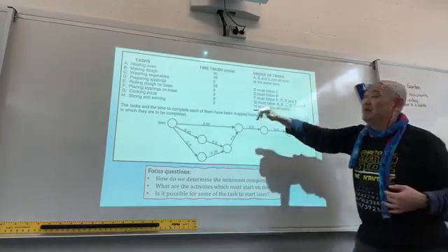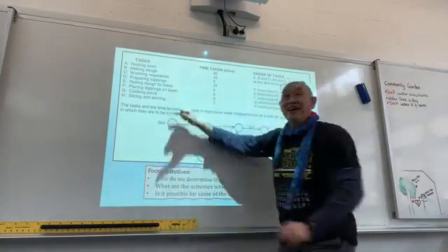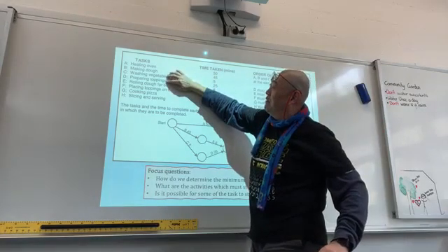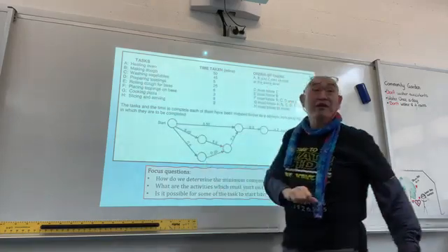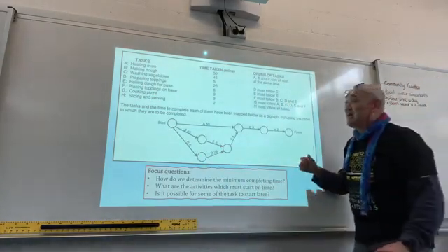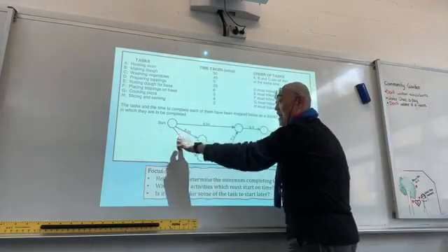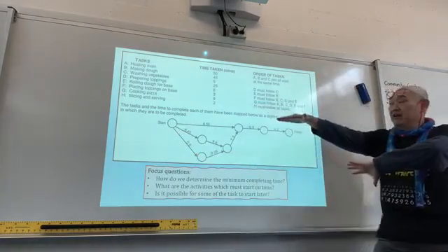E must follow B. You cannot roll the dough if you don't make the dough, correct? But those two, washing vegetables and preparing topping, are both independent from making the dough and rolling the dough. So therefore you can see that B and E are in a different path, and C and D are in a different path, because they are independent events.